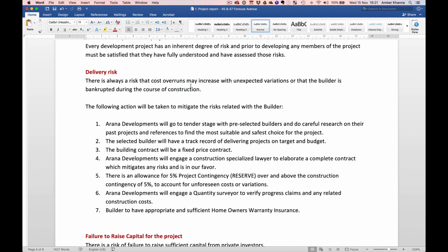Instead of saying that there's always a risk that cost may overrun, you say, to tackle cost overrun, I've allowed X percentage of contingency for this and this. So you'll have to expand the feasibility, and you'll have to do the full scale feasibility on this rather than the 2-minute feasibility, because it already has a DA. Yeah, I have to, and we're going to get to it.